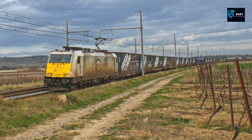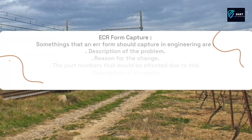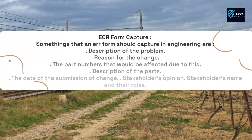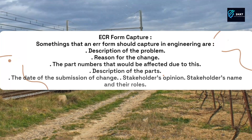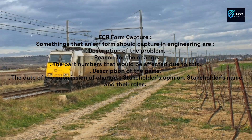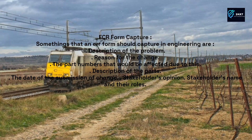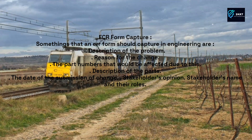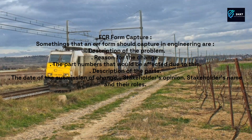Some things that an ECR form should capture in engineering are: a description of the problem, the reason for the change, the part numbers that would be affected, description of the parts, the date of submission of the change, stakeholders' opinions, and stakeholders' names and their roles.